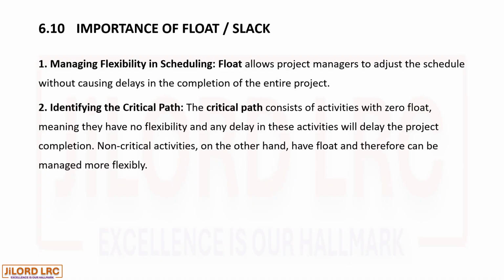2. Identifying the critical path. The critical path consists of activities with zero float, meaning they have no flexibility, and any delay in these activities will delay the project completion. Non-critical activities, on the other hand, have float and therefore can be managed more flexibly.